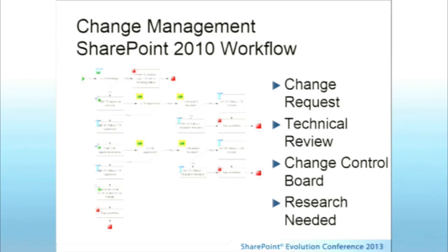We've got the main part of the workflow, and the main way of keeping the status of where we are in the change request process requires me to create an additional column. And it's that column that allows me to work out where I am in the change request process. Now, the main process will always get triggered on a change, but it may come straight out of the workflow process if this column that I've created says that the change request is in a pending status. And if it is in a pending status, then we'll actually fall through the process.